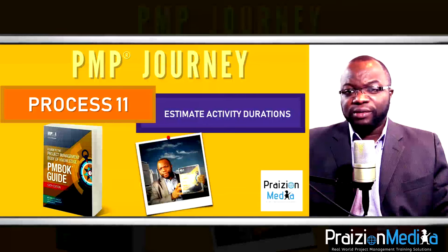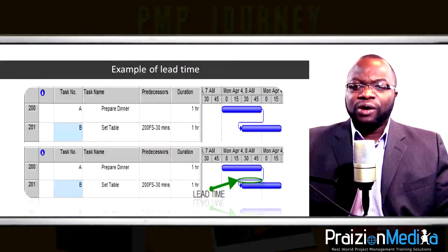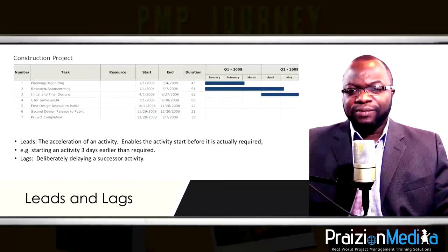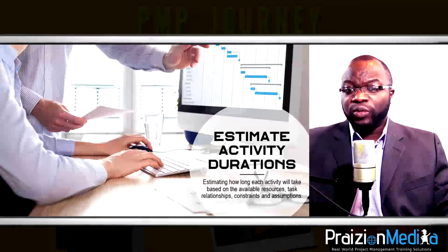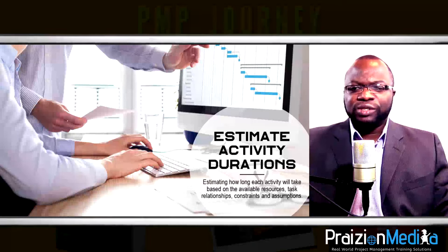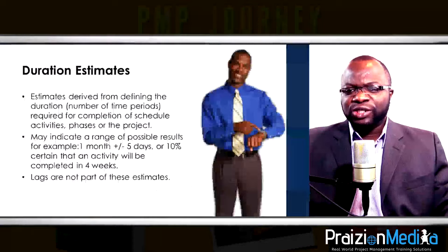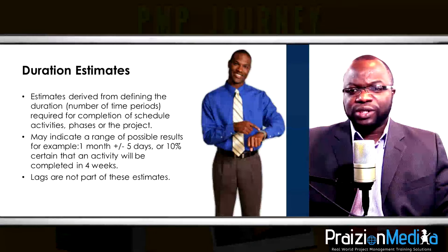Process 11: Estimate activity durations. Based on the resource needs and project parameters, you estimate how long it will take to work those hours. Are we talking about 50 hours worked in a week by one or two people, or 50 hours that needs to be spanned across several months because of lab results or other waiting periods? It really depends on the project.